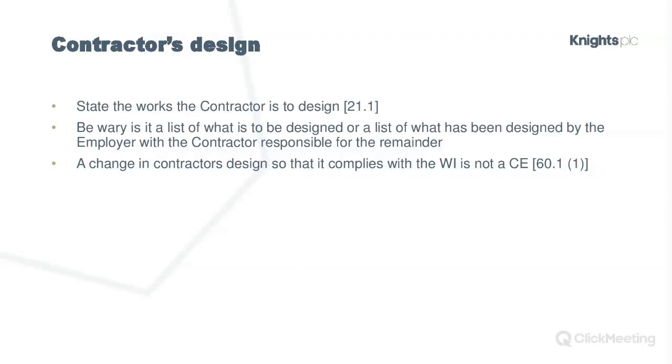In doing this they sometimes end up carrying out design work even when they're not contracted to, and it's all done to be helpful, but you need to be careful about that, because if you're doing the work, then typically under the law you will find that you're responsible for it.